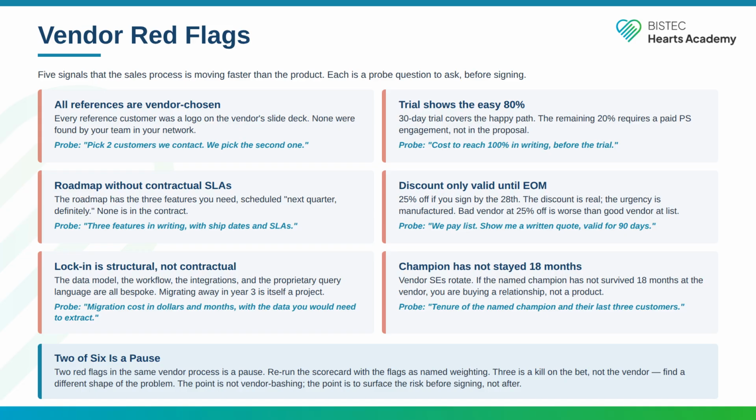Flag 5. Lock-in is structural, not contractual. The data model, the workflow, the integrations, and the proprietary query language are all bespoke. Migrating away in year 3 is itself a project. Probe. Migration cost in dollars and months, with the data you would need to extract.